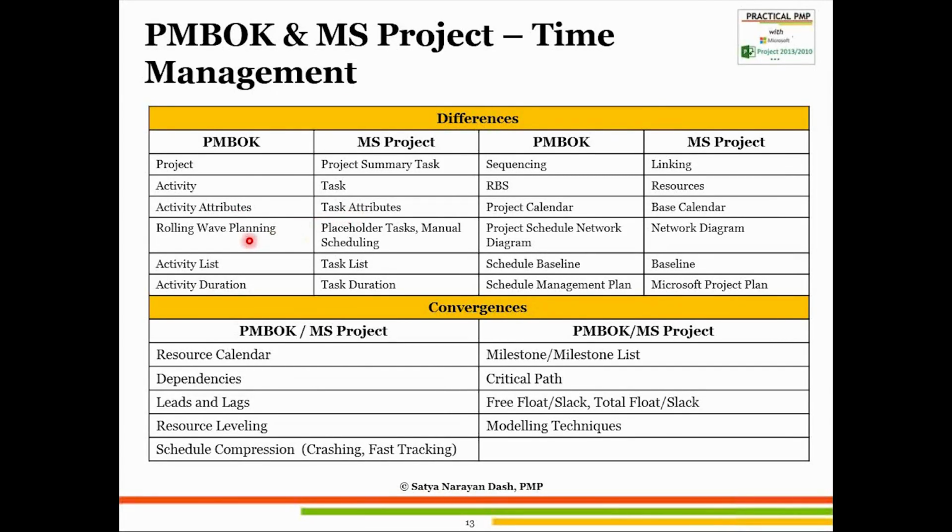There is rolling wave planning. Rolling wave planning is not only applicable in scope management where the decomposition happens, sometimes in time management also rolling wave planning might be needed. Decomposition is a tool and technique used in create WBS. Also decomposition is a tool and technique used in define activities.